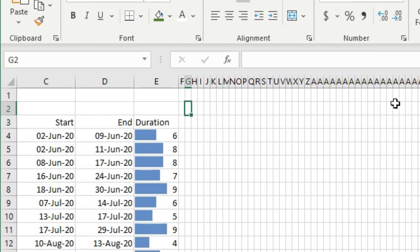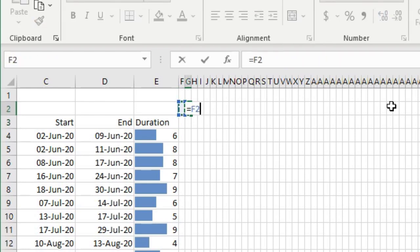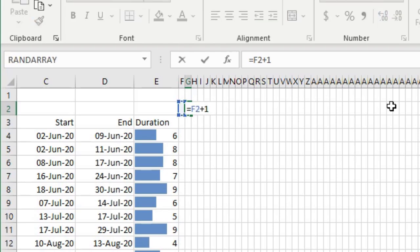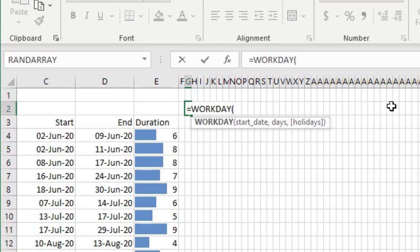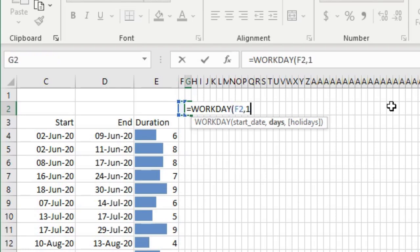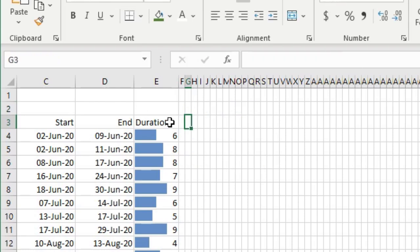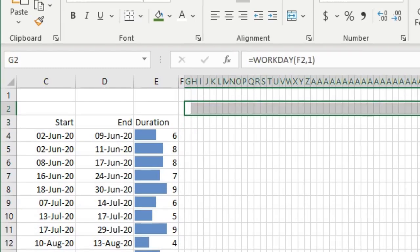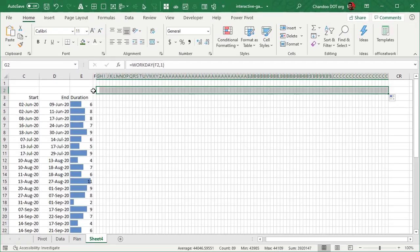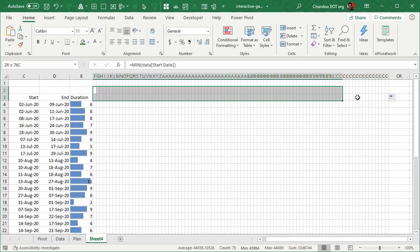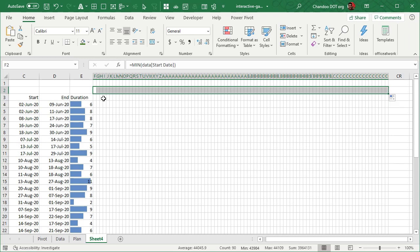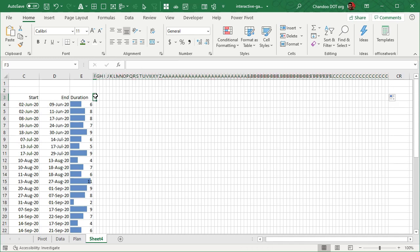So we could put any random date, for example, I want to see my project from 1 July 2020, I can just put that date. But a better option would be just use MIN formula and get the minimum starting date across all the items in the project. This way, this is actually tied in and then the next day will be plus one. Again, you can just do a plus one or you can use the network day or WORKDAY function to get to the next working day. It all depends on how you want to do it. I use WORKDAY option with one. So that will give me the next working day. So then we just drag this one sideways. And then we will get all the 90 working days. So it's not even three months, it's going to be more than three months because 90 working days could be about almost four months of time.